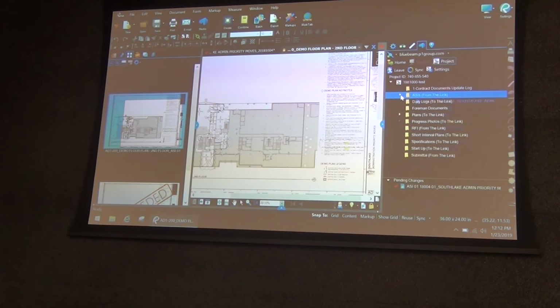So Nathan ran through, when he did the slip sheeting, you'll notice with the plans, we extract every sheet individually and link them to the cover sheet and then replace sheets as they're reissued. Plans we've been doing for years, it's pretty simple because every sheet is just an individual document, so you just extract them one by one. The specs that he went through first was kind of a second phase that we came up with, because with the spec section, one section could be 5 pages, the next one's 12, the next one's 22, so you couldn't just go through and extract them all individually.